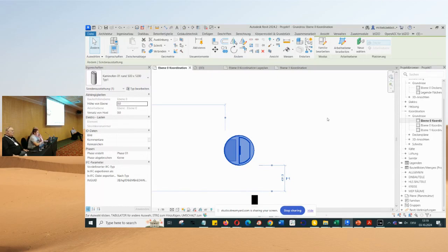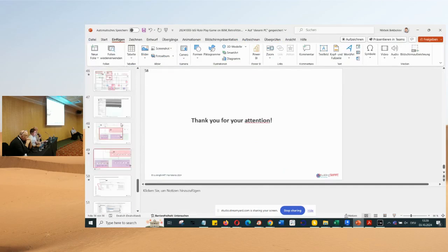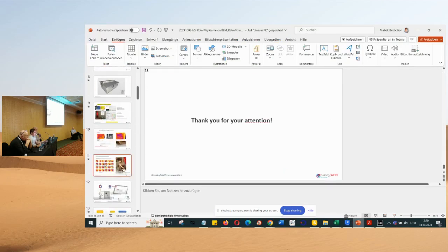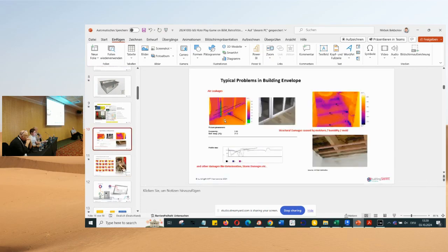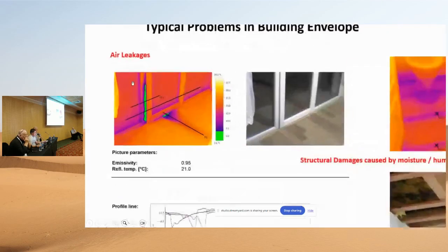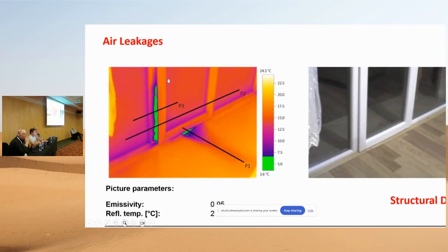So after a while, it's wiser to get the energy bill and assume that you have some kind of airtightness, because you have to keep the promise that you're going to deliver. It's more important that your promise is on a higher level than that. Don't recalculate the existing building over and over again. That's my suggestion, because you're spending a lot of energy looking at the existing building, when you have to put the energy into how you promise your new skin, your new solution. I agree with you.